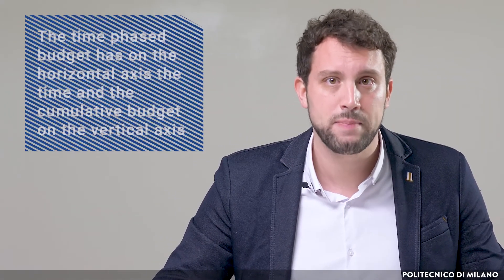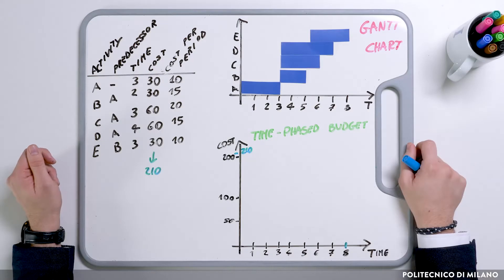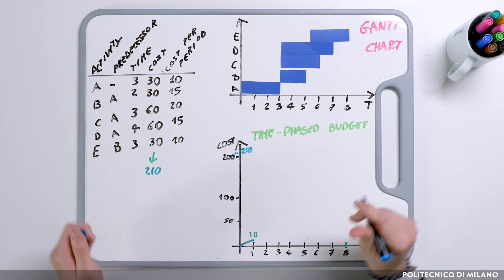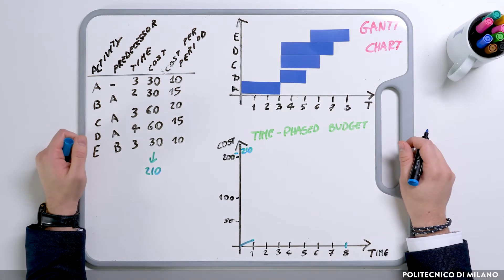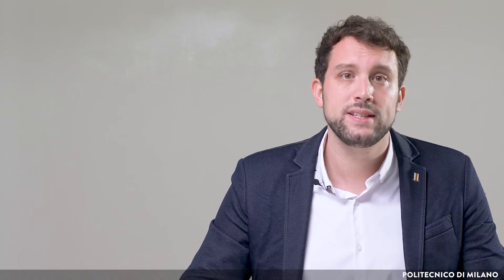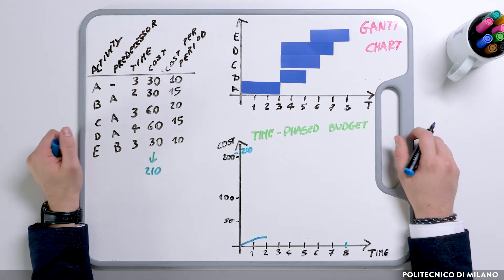Let's start building the time-phase budget from the Gantt chart. It has time on the horizontal axis and cumulative budget on the vertical axis. In period 1, we'll be working only on activity A, which has a cost per period of 10 — so the first point of the time-phase budget will be 10. In period 2, the same situation applies, giving a second point at 20. Note that the time-phase budget is a cumulative curve, summing costs period after period. The third period has the same impact, reaching 30.